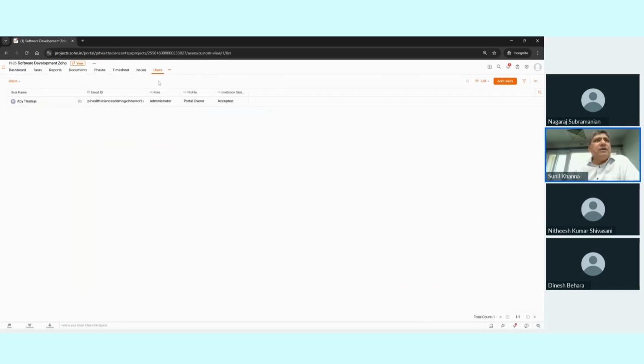Finally, in the project, you will be able to see who the different users are. You have 2 types of users, client users or your company users. And in addition to this, in case your company utilizes certain resources, for example, if you are a manufacturing company and to manufacture some item you are utilizing some equipment, you can create those equipments as resources. Or you are a construction company, you utilize a dumper or a mixer. For that matter, you can create resources along with the users and you can plan for your project.